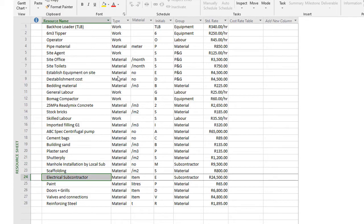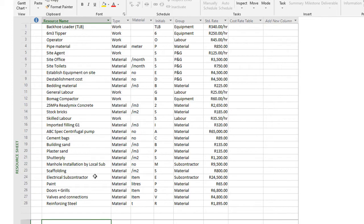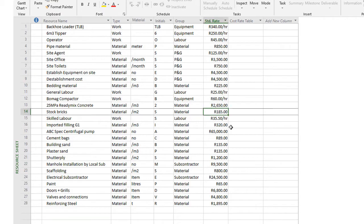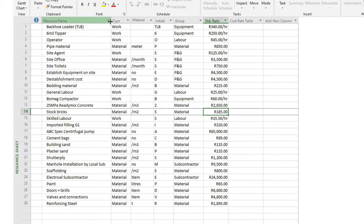In future, if you get a new project, I'm going to use the same resource sheet that I've created in MS Project and simply change my rates to whatever's relevant at the time. So if my cement or stock bricks are costing me 200 rand, I'll simply adjust it here and it'll be adjusted throughout my whole estimate.